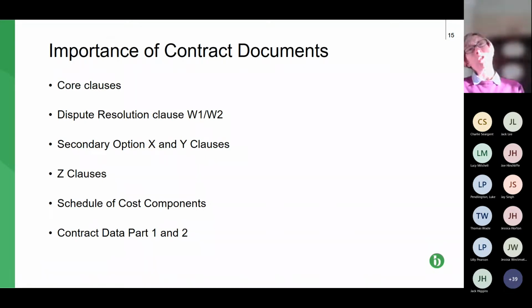So just to conclude on your letters of intent, you need to make sure the letter itself is a binding agreement between the parties. And as I say, usually it's clear from the words used in these kind of 2 to 6 page letters that it is binding. There's provision for X work to be done for a certain price, but you also need to keep an eye on the limitations, all of the limitations. So timescales, the scope of work, the payment. As soon as you're coming up to any of those being exceeded, you need to get an extension to the letter of intent, which needs to be signed off in writing.